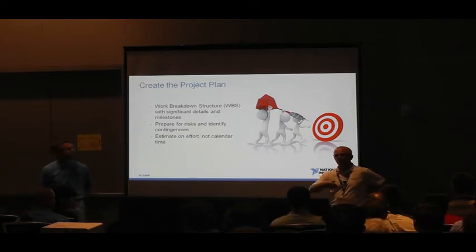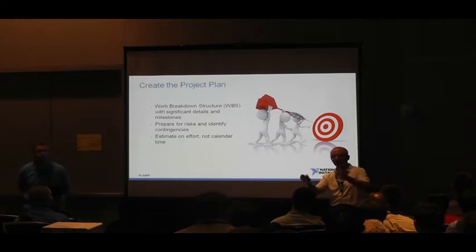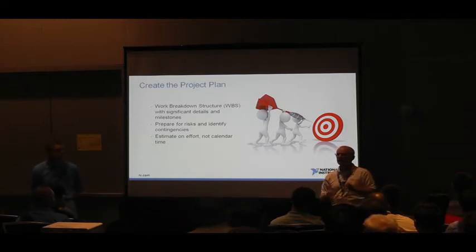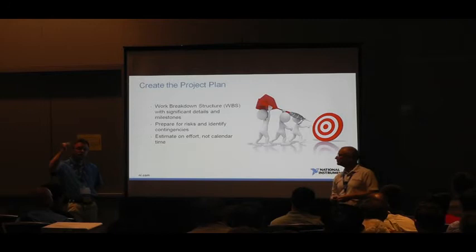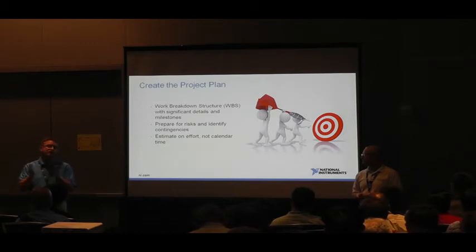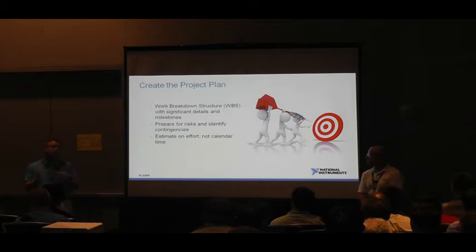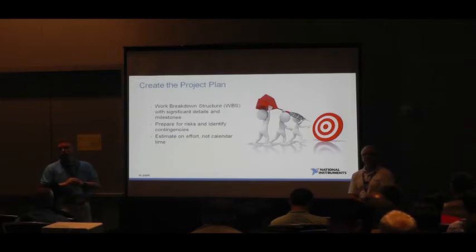Right, so if we're working to come up with a test system for testing a product that's under development and still changing, it's very difficult for us to do a fixed price. And so we almost always go time and materials for that arrangement. But to your point, we probably would treat it differently depending on what the customer has set up front. Hey, we're going to do this time and materials. So we might say, okay, we don't need as much requirements, but we still do need a scope of work. So we do a discovery phase. We've added that as a first phase to almost all of our projects.